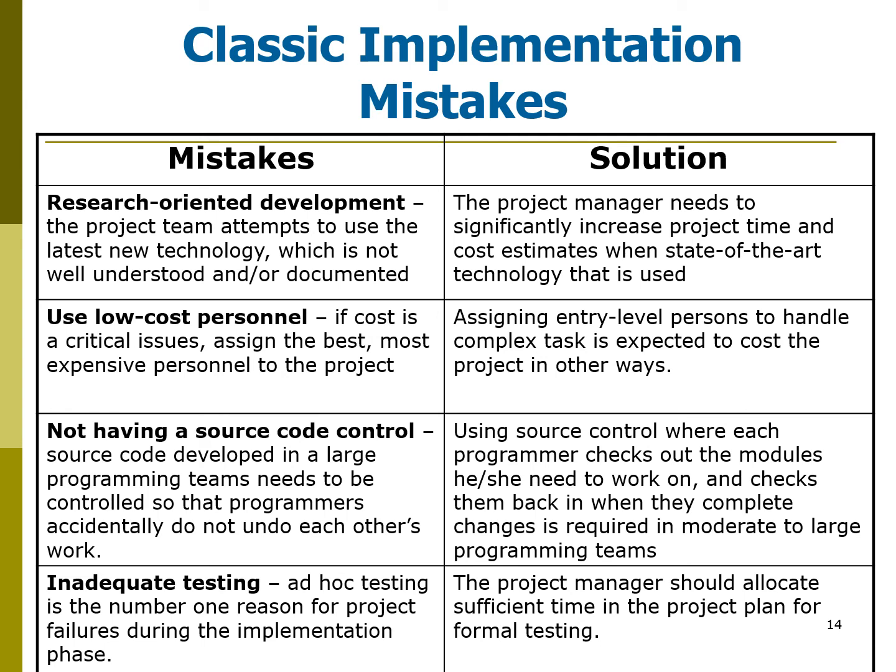So if the project is research-oriented development, a way to avoid errors is to allow more time, so that the team is more familiar and has more time to learn about the technology.